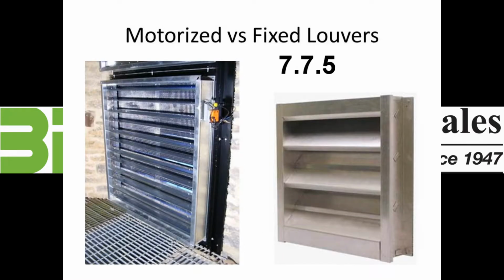When using motor operated dampers, make sure that they spring operate to open and motor closed. A lesson learned on a project, the contractor disconnected the circuits such that the motor operated dampers went to their spring open position. This was winter time, so to keep the room comfortable, they mechanically closed and locked them. Of course, this locking was not removed once the work was done, and the next time the emergency power supply system was needed, the vents did not open.